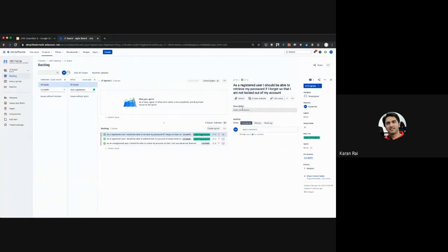So the part about how do you integrate an email? Yeah. So exactly. That's another additional point, right? So did all of us consider that? Maybe not, and that would probably make it slightly more complex. So we could end up revising it to maybe an 8 if all of us agree that we didn't think about that aspect.